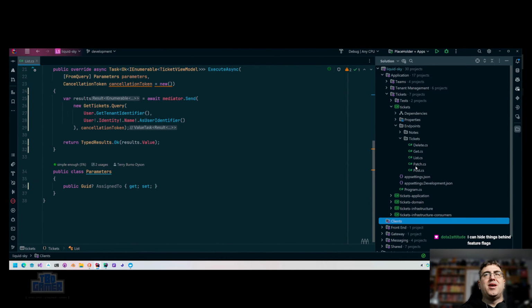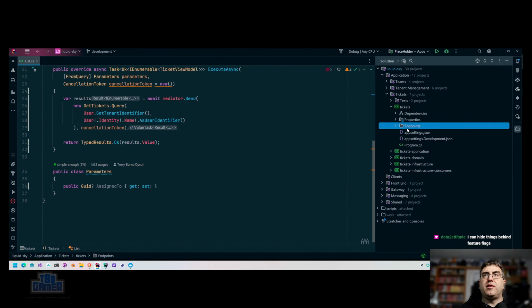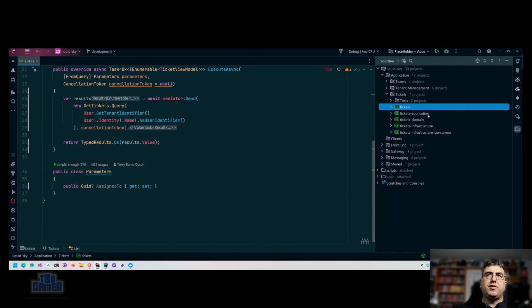Right, yeah. So what is the value in doing that? And where is that controlled? One story that is a little larger is a little bit more difficult, a lot of things to do at once. So let's go for your path. Your path would be that is still one story, but has several tasks. There'll be a task for the UI, there'll be a task for the API. Each one of them would have its own PR attached to it, so there's actual work independent. That story then rolls up and has value.